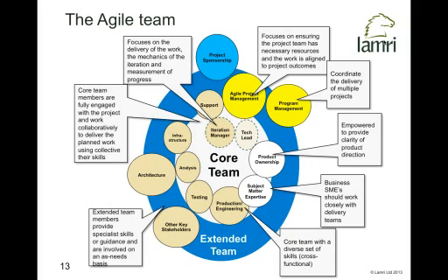And the idea is this guy is focused on the team, on the mechanics of the iteration, measuring progress, and getting obstacles moved out of the way, and coaching and facilitating the team to do Agile more effectively and be more effective themselves. So constantly kind of almost mentoring and coaching the team through the process of delivering that Agile project. Sometimes we might find that actually we need to wrap around him and give him effectively a project manager, an Agile project manager, to help support the team in the larger environment. So focusing on the result, has the team got the resources, and looking at the alignment with project outcomes, for example. So we kind of get this idea, this kind of onion skin model, really, where we've got the core team and then potentially an extended team that sits around them, helping them deliver.